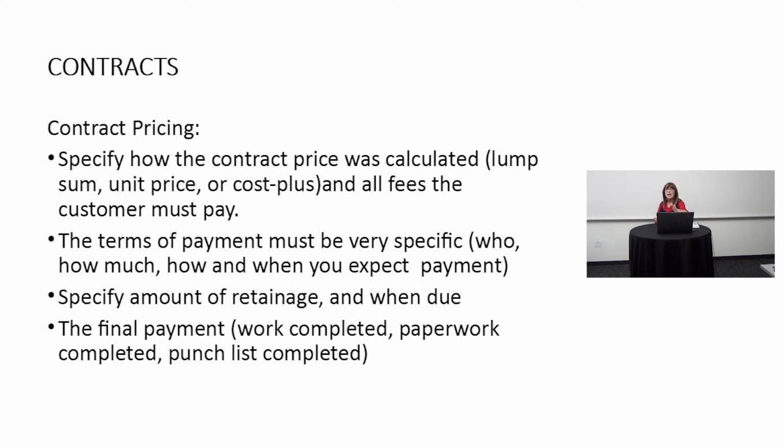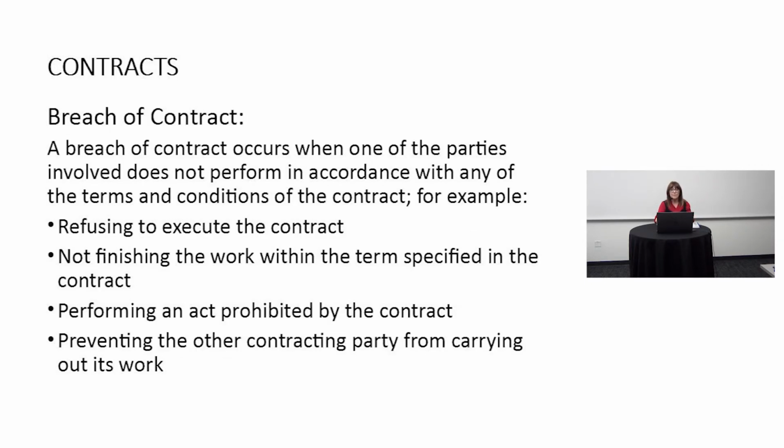The final payment. When do I get my final payment? The work has to be completed, the paperwork has to be completed, and the punch list has to be completed in order for me to receive my final payment. So you want to talk about that. When am I going to get paid, and how am I going to make that happen?